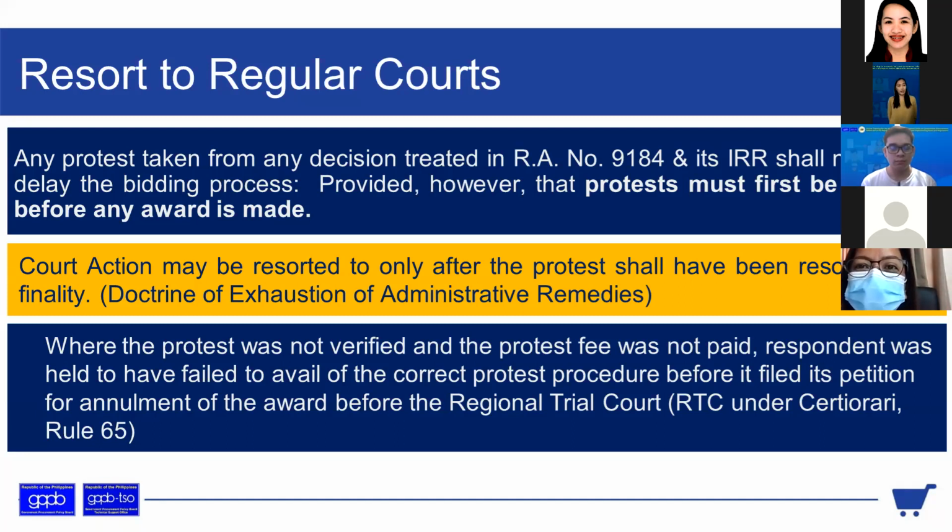Lack of jurisdiction yan. So, pag yun yung ground ng dismissal ng protest, hindi din siya pwedeng dumiretso sa RTC, yung aggrieved party. So, court action may be resorted to only after the protest shall have been resolved with finality. No? Tapos na yung 7 calendar days after i-notify ng BAC Secretariat yung aggrieved party sa desisyon ng HOPE. At the same time, yung decision was not on the ground na hindi verified or unpaid yung protest fee.